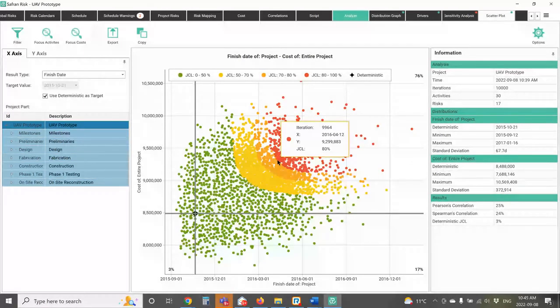Okay, so let's take a look at the questions that we have. So the first one is, can we have constraints and lags in the model? Yeah, absolutely, you can. There's nothing to stop you from doing that. The model won't break. However, if you've got a must finish by constraint, the activity will not move beyond that point, and mechanically the tool will still work, but you may get results that are not accurate. So you always have to be aware of the impact of constraints